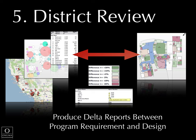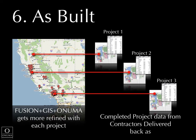As projects are submitted back in the BIMStorm, we'll be checking for deltas to see what spaces are out of range and to allow owners to watch what's going on with the teams. That's a big theme of the BIMStorm: progressive development, not milestone submittals, but interacting on a more consistent basis with the owner. The next part is when the project is complete to submit it back as an as-built to the district.